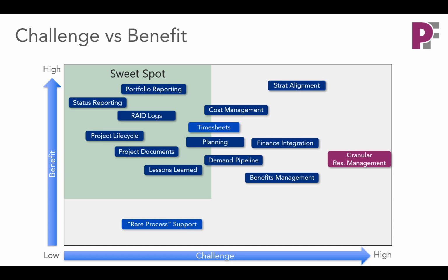And usually this is achieved through a sort of bottom-up planning approach where effort is attached to tasks within a project plan. And if there's 1,000 tasks in the plan, well, all those effort values are aggregated to give us a total demand for resources by individual resource names and roles over time, and we do that for all of the projects, and then that's our portfolio resource demand and so on.